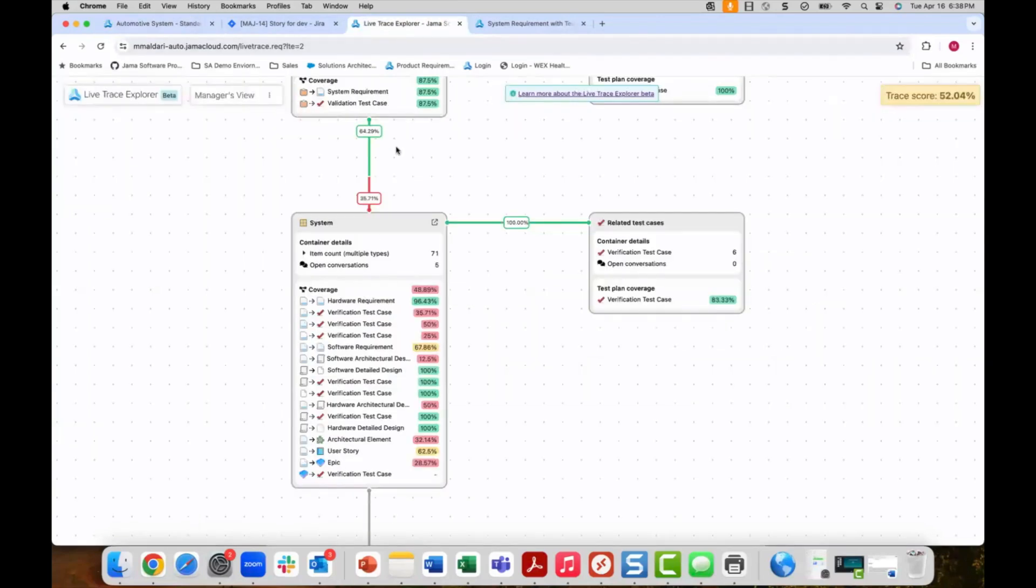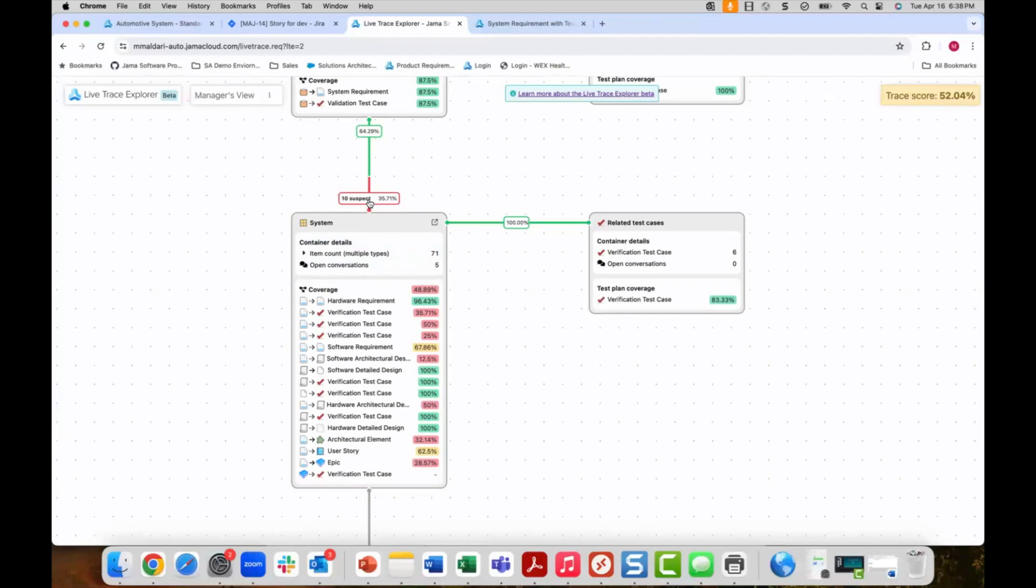How do I know if changes have been made at the system and or hardware level that impact the software team? This can be easily tracked in the live trace explorer by viewing the percentage of suspect relationships. Each of these can be reviewed for impact and cleared upon proper assessment.